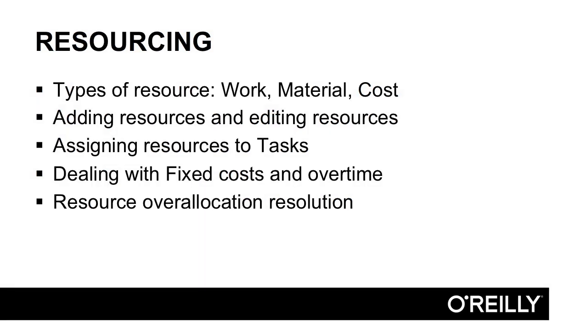Then it came to resourcing, so actually deciding who or what was needed to carry out each task. So the variety of different types of resources, being work, material, and cost, how to add those resources into the resource sheet and edit them and edit their properties, and then assign those resources to various tasks. And we saw that there were a number of ways of assigning your resources to your tasks. How we would deal with fixed costs and how we would deal with overtime when assigning our resources.